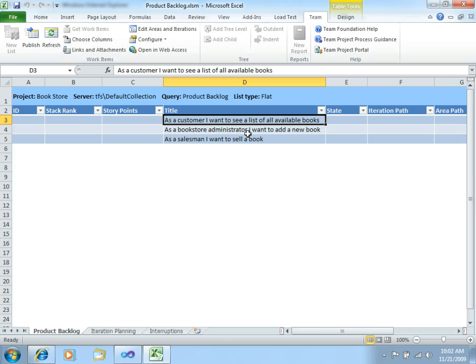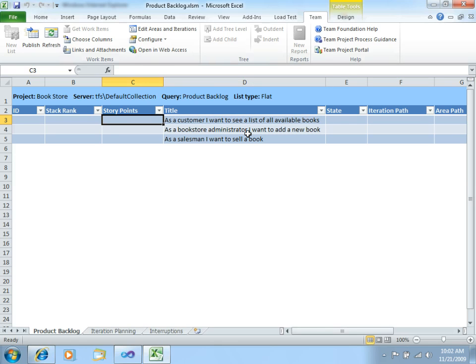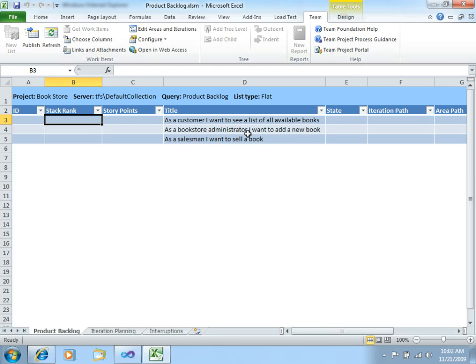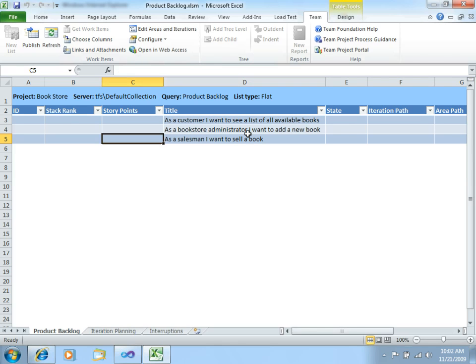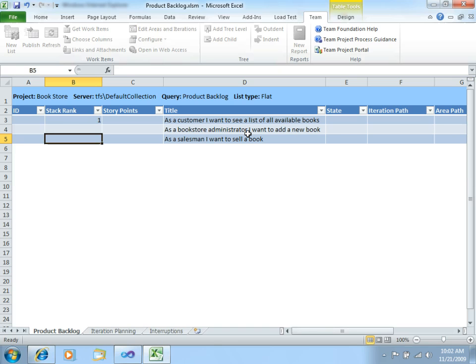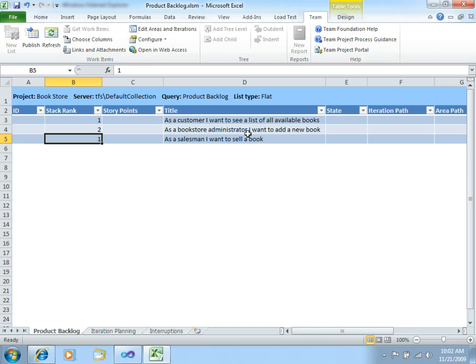And what we should do right now is to set some priorities to these User Stories. This is a common practice that will help you to always focus on the most important User Stories for your application. So, from my point of view, the most important thing here is that the user can see the list of books and that the salesman can actually sell a book. So, let's put priority one for both these User Stories, and let's just use priority two for the third one.